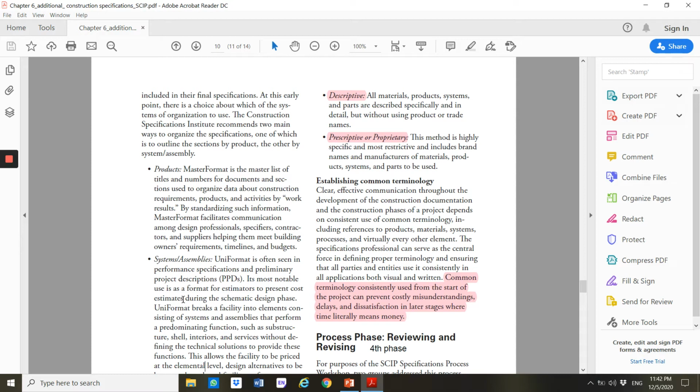You have to check. If you are a contractor, make sure you read the specification, because sometimes they will say, okay, white horse or equivalent. It means if in that area you couldn't find white horse, you couldn't find pink white horse, only MLM. When you ask, the rep says, okay, that's fine, because there is equivalent. But in his case, the word equivalent wasn't there.